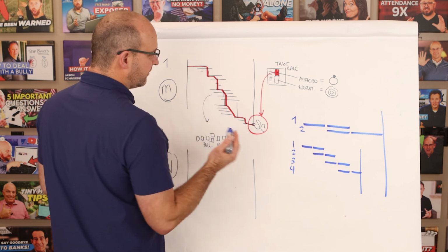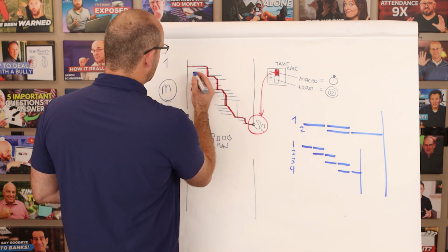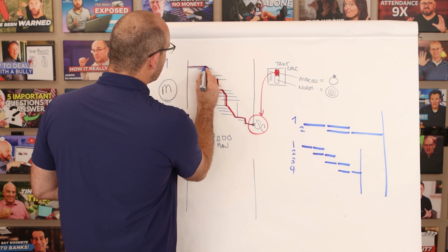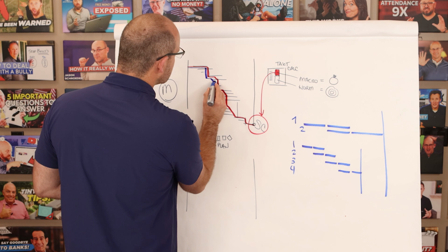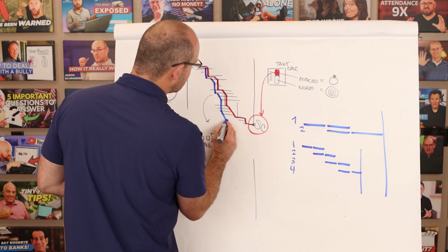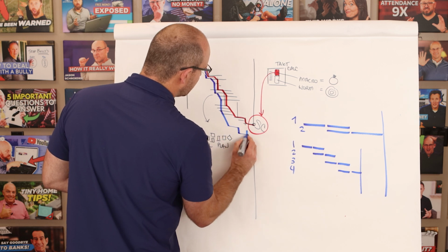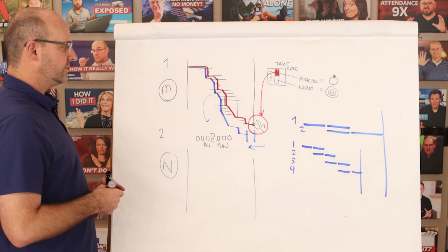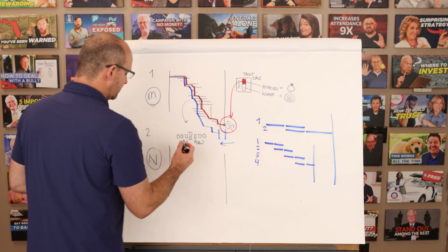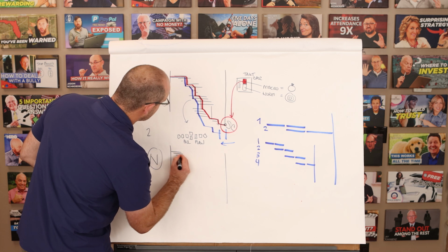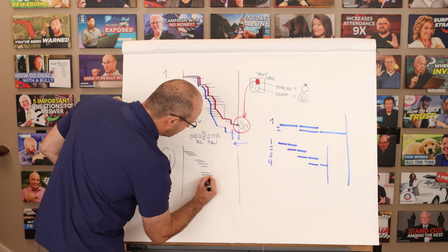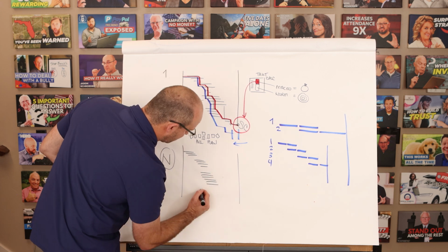So the path of critical flow, I'm going to draw it in blue to just show that it's different. But when you come up with your norm level zoning strategy, your path of critical flow will look something like this, right? And it will start to incline, and it will provide you an earlier duration, right? It'll pull this forward. Okay, so if I was going to draw that, and I'll do my best, you might still have some of the early activities, but the next zone is optimized as well, right? Then we get down here to the interiors, and you've gotten a smaller zone size.